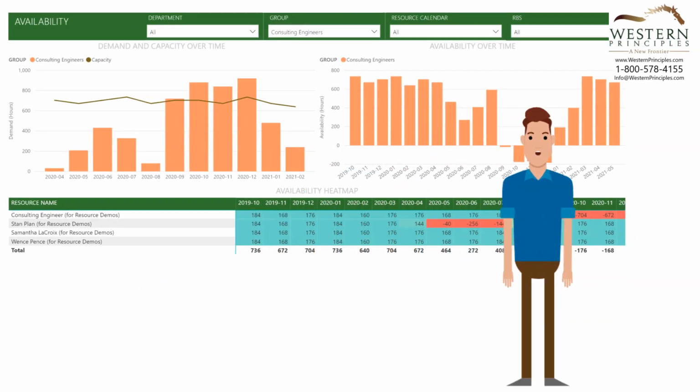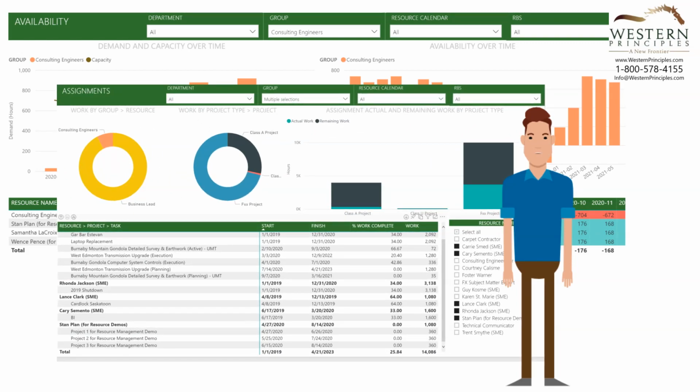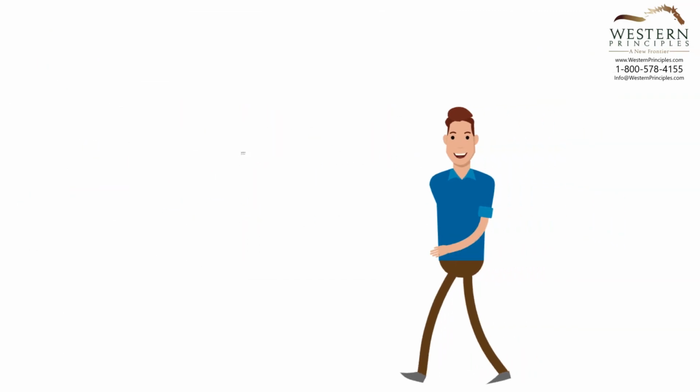For resources, the Power BI Content Pack for Microsoft Project has rich resource reports that quickly help you spot over and under allocation of your team. A PMO director might use this type of report to quickly spot problems where resources aren't being used well and drop down to the resource assignments dashboard to start to fix the problem.